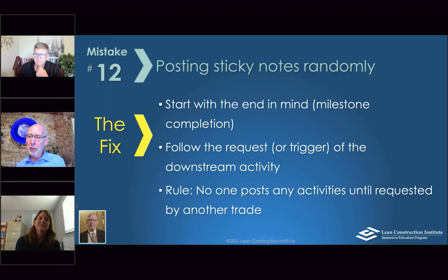And so if we understand that the posting of sticky notes is really the outline layout of our commitment map, then we understand how dangerous posting sticky notes randomly can be. We understand how using the wrong color, mixing and scrambling stuff up, can hurt. When you walk in the room and nobody else is in the room, and you get into your own self-thinking session, and you start moving sticky notes around, that's about as forbidden as it gets. There are things that can absolutely screw up other people's ability to complete the commitments that they make.